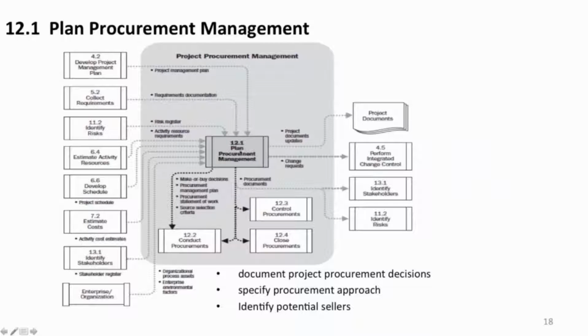Cost estimates come in. These are sounding boards. Again, you've estimated your cost for this item, and now I'm going to give you an actual bid. If you say this is $500 and I say, no, it's going to be $2,000. Why? Well, your technical requirements require it. So you look at the second bidder, and he's $2,000. Well, maybe I'm right. And now you look at a third bidder, and he says, okay, $600. Why the disparity? Now you've got a real quality question in your head. What's the difference between what he would give me and what this guy's going to give me? Am I going to get a good quality product or not?